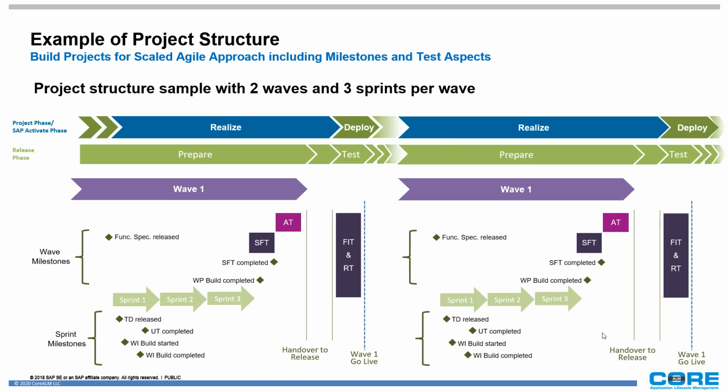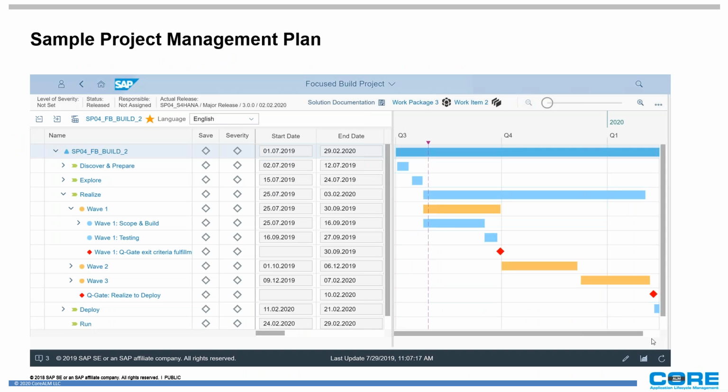Then again, this is for within our wave 2. So if you have another wave, then you will start that process again, where you're building everything for that wave, and then you'll do another functional and integration testing. And in this case, if this is wave 2, at the end of wave 2, we'll have to do a regression testing because we just brought new things to wave 1 as well. And then this is what we go live with, both of those waves.